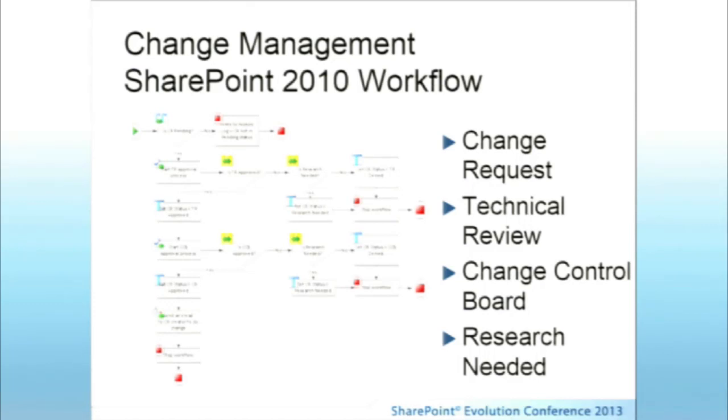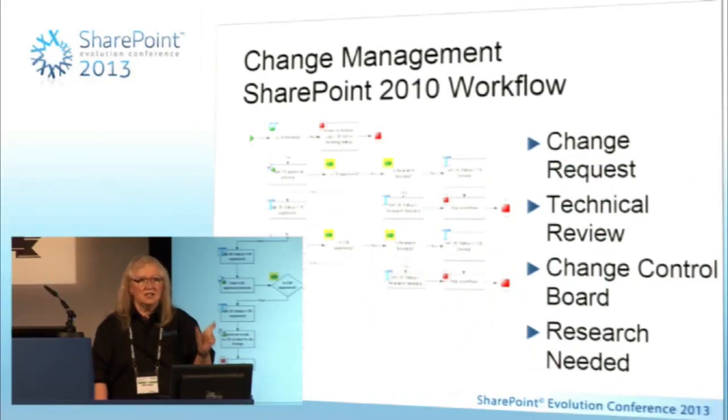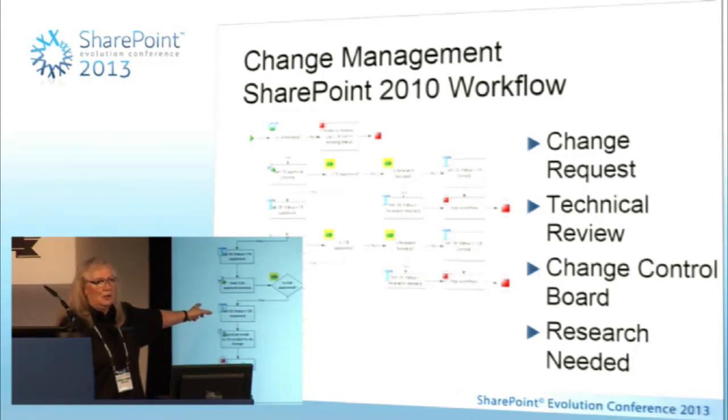So we'll then get some approval from the technical reviewer. If he says more research is needed, I will set this new column to feedback required. And when that column has feedback required, only then will the secondary workflow be triggered. I will then close or stop this workflow. The secondary workflow will then do its work. When the information is provided, it will turn the CR status column back into a CR pending, which will trigger the main workflow again.